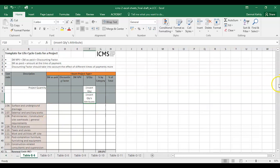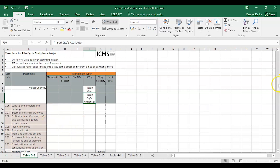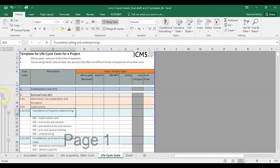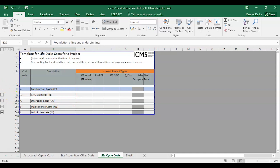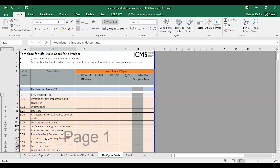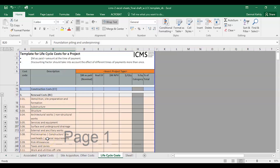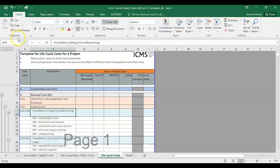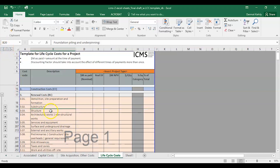This is what the ICMS provides, or at least what the RICS provides, in terms of a breakdown structure. I've taken that and added a bit more functionality with further breakdowns. I started grouping the main headings into subheadings, similar to what the RICS provides, and I added a further Level 4 breakdown structure — Group 3 and Group 4 — which you could use for a detailed life cycle cost exercise.